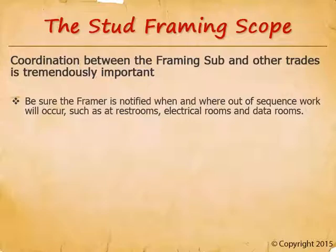There are two suggested ways of showing out-of-sequence work in bid documents: preferably on the project schedule, or if not detailed enough, in the bid instructions. The framing bidder needs to know all room numbers that must be constructed out of sequence. Otherwise, the framing subcontractor is unlikely to do this work without receiving a change order for it.